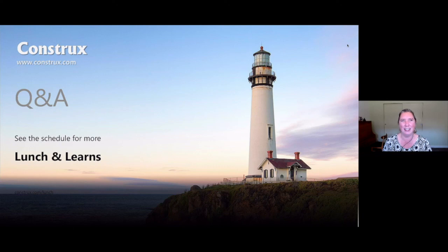So one thing I had thought of as I read this question was making sure that your statuses are always fresh. I like pull-based systems like a Kanban board where somebody can go to the board physically or digitally, and the board is up to date. The board tells what the status is right now, as opposed to everybody having to take time to do a weekly status report and email it to somebody who compiles it. And by the time it reaches anybody who can do something about the problem, it's 3 weeks old and everything's changed. And I'm a big fan of exception-based status reporting, right? If everything's on track, I shouldn't have to be doing status reporting.